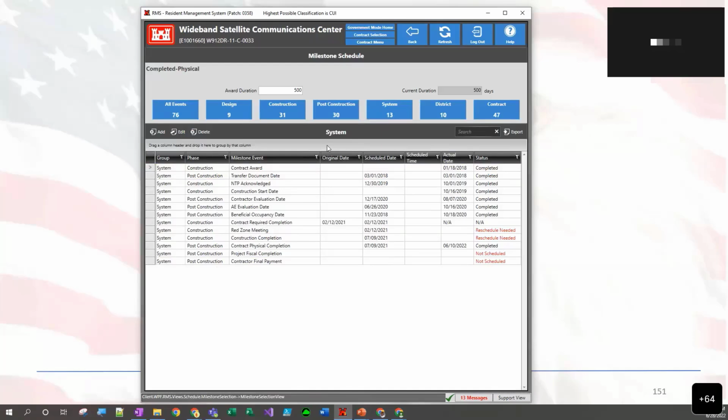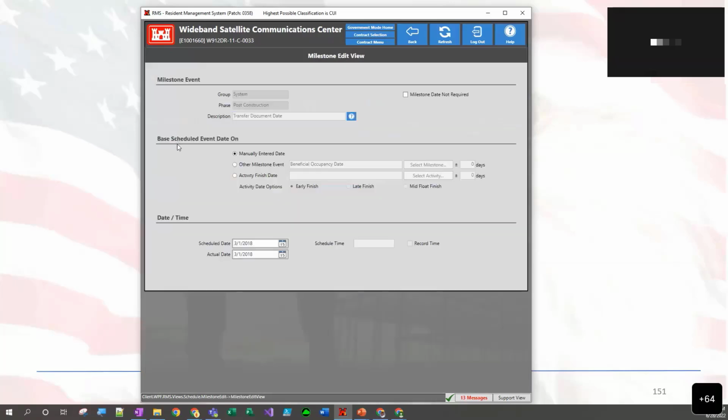So it would create another set of system milestones for each phase then? Correct. And what you'd want to do, if you want to do it from the start, is create a separate WBS band in P2. Right. And that will automatically create a separate phase in RMS as long as the contract setup has the setting unchecked so that you're not using just one phase. Otherwise, it'll combine everything into one phase.